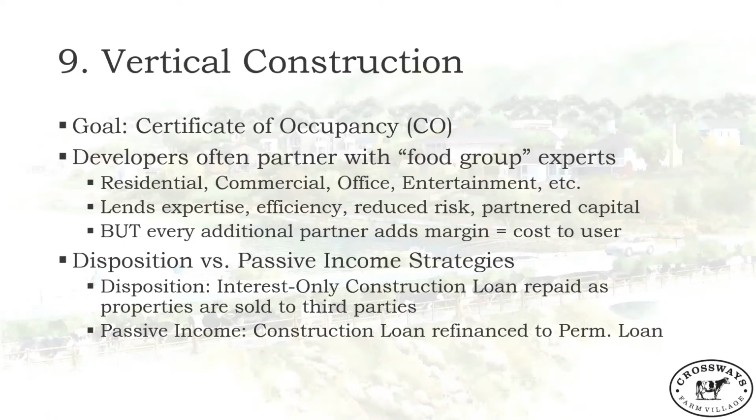And so the loans, at this point, you have to pay back that acquisition and development loan that you took out with Texas Capital Bank. You've only been paying interest throughout the previous stage of site development. And so now that principal is due and you are still incurring interest. So as you look at all these different strategies, you try and get a lot of money up front, and you do your best to sell lots and sell houses quickly before you get into the very complicated projects. And with the proceeds from those sales, you pay back that first bank. And so now you and your equity partner have 100% control of the project. And so you can start looking at other loans if you want to take them out for specific projects.